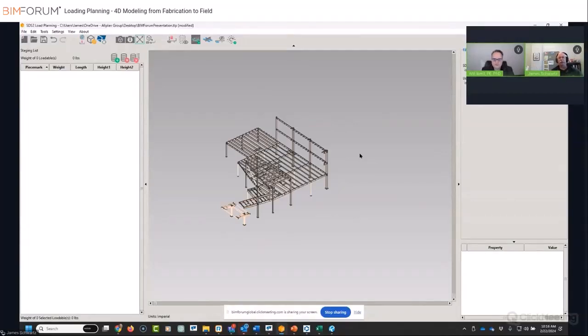And basically, we are looking at two sequences that I'm breaking down into smaller areas, so I can build this project. One area where this comes up as important, if you're in the audience and you're doing 3D coordination for MEP, a lot of times the buildings will be zoned by level. And something that is particular to structural steel is, a column is going to go all the way up however far it goes across multiple levels.